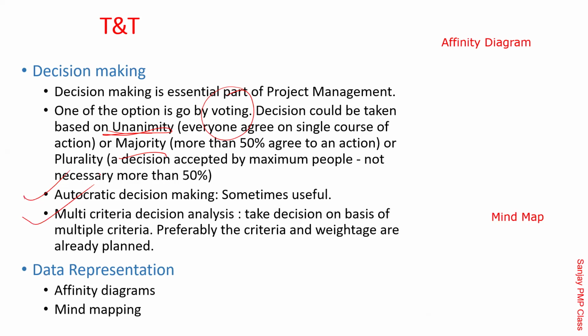Sometimes multi-criteria decision. Very commonly, if it is an IT type of system, one of the criteria could be number of users impacted. One could be whether it is impacting financially. One could be how much investment is required. Each requirement will be weighted on the basis of these criteria. The requirements impacting multiple users will be given priority. The requirements impacting financial things will be given priority. Those are the ways in which you do the multi-criteria decision analysis technique.